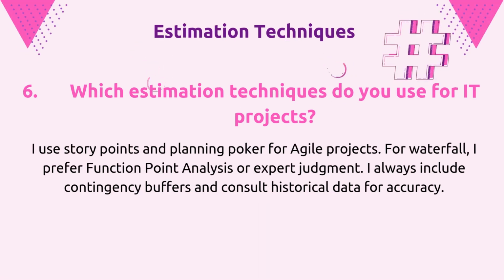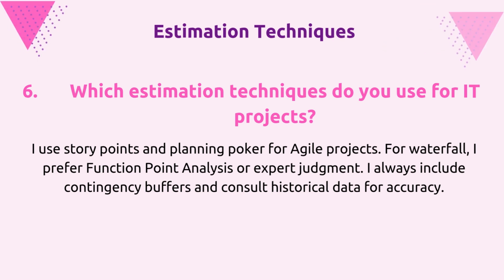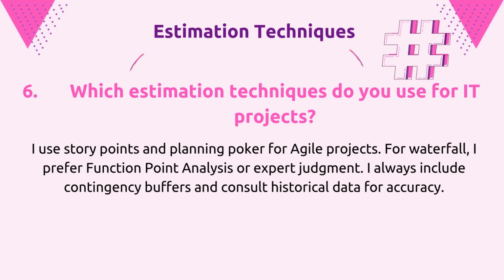Question 6 related to Estimation Techniques. Which estimation techniques do you use for IT projects? I use story points and planning poker for Agile projects. For waterfall, I prefer function point analysis or expert judgment. I always include contingency buffers and consult historical data for accuracy.